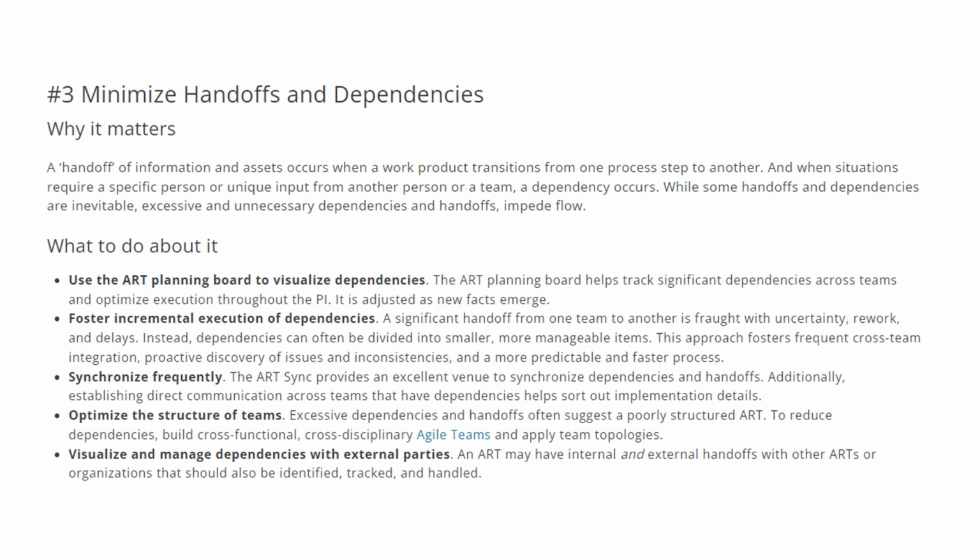First, foster incremental execution of dependencies. A significant handoff from one team to another is fraught with uncertainty, rework, and delays. Instead, dependencies can often be divided into smaller and more manageable items. So, this approach fosters frequent cross team integration, proactive discovery of issues and inconsistencies, and a more predictable and faster process.